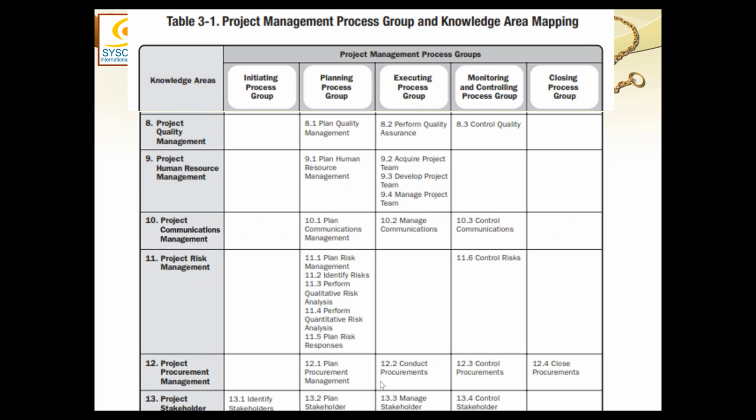Procurement: naturally, we have outsourced some work to our contractor. Now we are just managing that contractor according to the terms of the contract. So in control procurements, we audit the contractor's work, we give approvals, we give permission for him to be paid, we accept his claims, we check his deliverables, and whatever is not in line with the contract could lead us to a change request.